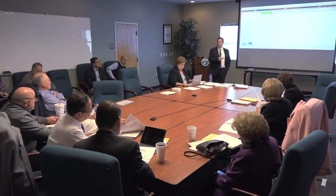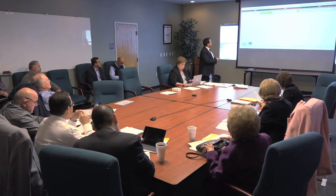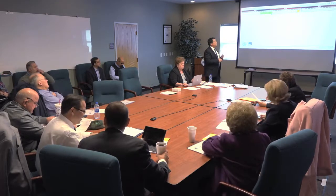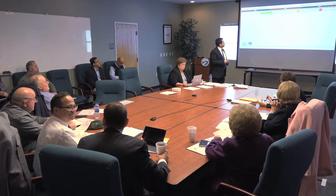Now, I need to remind you, substantial completion is when the building can be occupied for its intended use. So there's still some occupancy after that, and typically that takes 30 days. When you say occupancy, that means move in furniture and make sure the lights are functional. And then, at the end of occupancy, for all practical purposes, you're able to use the building as you like. But in here, I'm also adding when we're planning on moving in, and in this case that should be in June. If you can read there, I apologize for that. But you'll be summer one.